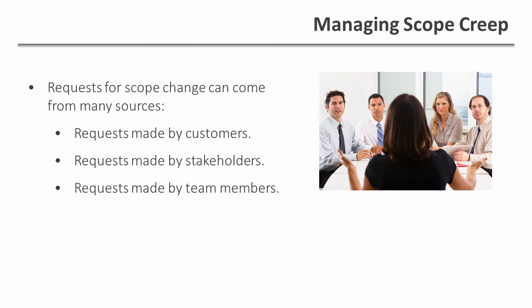Finally, one of the most insidious sources of scope creep is the team members. Team members will start doing additional work that they think would be great for the project. If it's not required, it leads to scope creep. You need to be on guard against scope creep from any of these three sources. But what do we do?